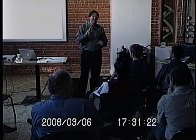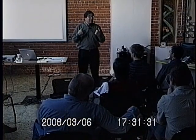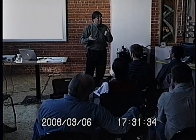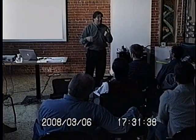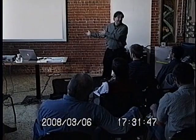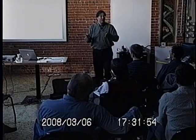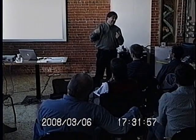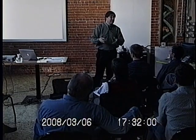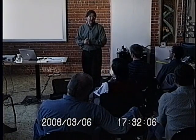And the second pushback I get is the architect will say, you know, the mechanical and electrical people that I work with, if I invite them to an early meeting, they don't know how to make recommendations and decisions without any information. They can't really operate with a cloud. And so there are still some people that haven't had a chance to practice this early decision process, and they don't know how to do it. And I have to give them, okay, fine, either find another mechanical engineer or hire a specialty lead consultant to come in and sit down with them and help them through it the first time. Those are both possibilities. But those are the 2 points of resistance that I hear about.